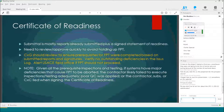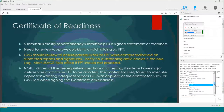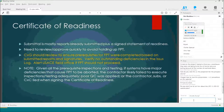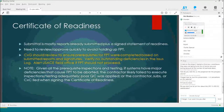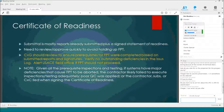Given all the prerequisite inspections and testing that lead up to the final test, if systems have major deficiencies that cause the functional performance test to be aborted, the contractor likely failed to execute inspections and testing adequately — basically poor quality control. If you do all the different testing along the way and have a specialist following all of it, then at the end if the final test is going really poorly, they had poor quality control or they lied to you when they gave you the certificate of readiness.